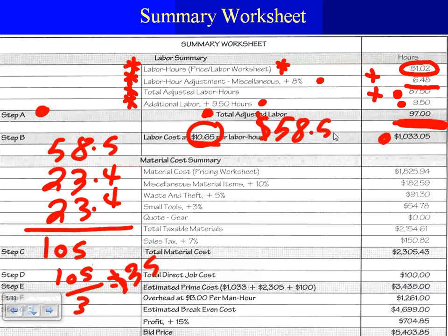Now, take this: if you are a non-union shop, and you're going to pay $25 an hour, right? Electrician, $25 an hour. Give him one more $5 for benefits, health, and so forth. So you're sitting probably at $30 an hour for a journeyman. Apprentice, you pay them $12. So do an average for 35 plus 2 12s, and you bid your job, and you add your profit and your overhead. See how the difference can be substantially different.